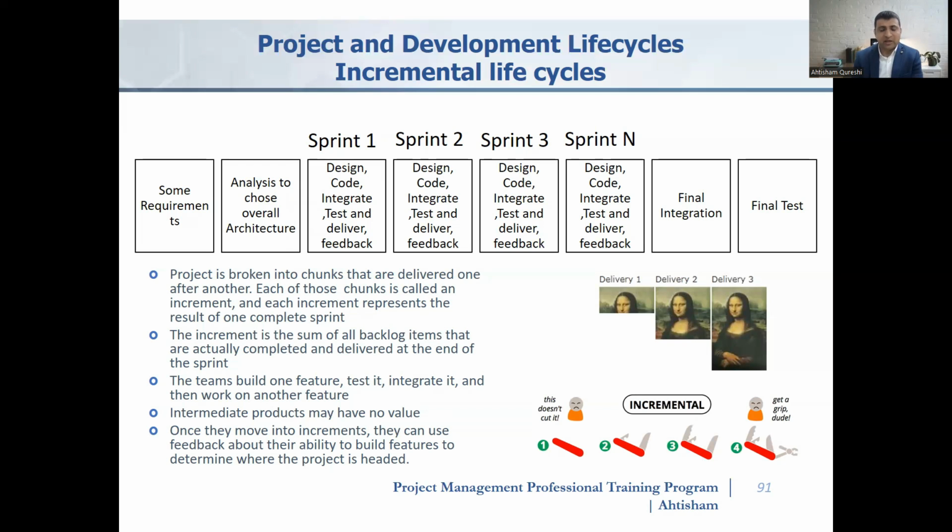We say, okay, we are going to develop something incrementally, and we'll take some feedback from the customer gradually as we move along. And then if he's okay with our understanding of the project and our delivery, then we will move forward to the next increment. Okay, so the incremental approach of delivery is that you take some requirements and then you try to build them. So you repeat the whole phase of design, code, test, integrate, and then you bring something ready for the customer to view and give you feedback.